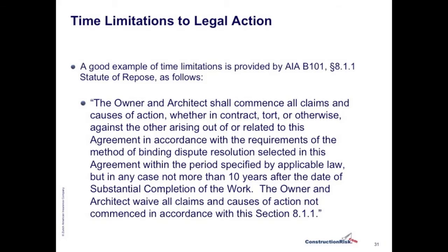Close quote. The beauty of that language is that what it establishes as a starting point for a statute to run is the date of substantial completion. So you'll have in some states that an owner of a project or someone could file suit against a design firm 40 years after discovering that they've been injured.